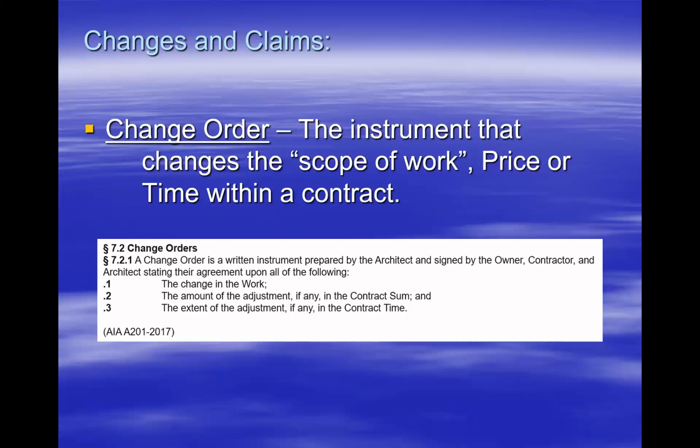Now, some may argue that that might be a little bit ridiculous because, you know, a light fixture is a light fixture, but let's maybe use another example where we're saying, okay, we're going to change the plumbing in a bathroom and we're going to decrease the contract amount by $10,000. And we're going to add a bunch of electrical on this project, and it's going to add $10,000 to the project. Okay, and if we were to submit both of those changes in one change order as an instrument, then obviously that would have to be documented because we're changing the scope for potentially two different trades as we're looking at the project.